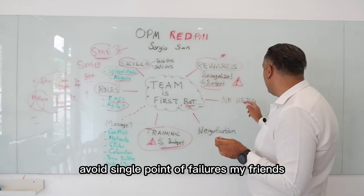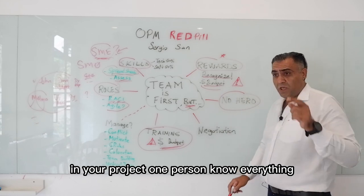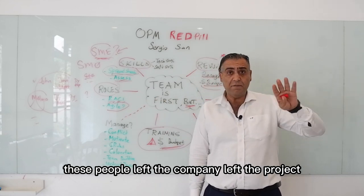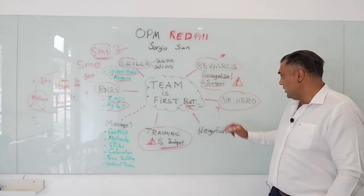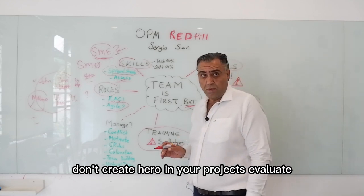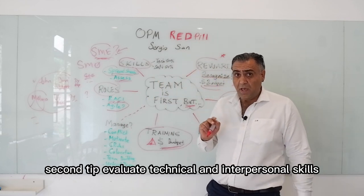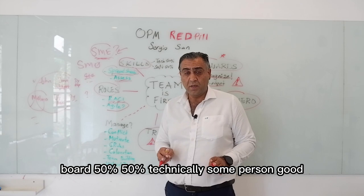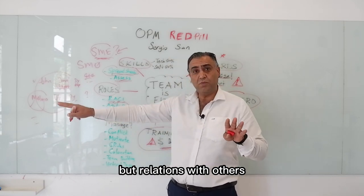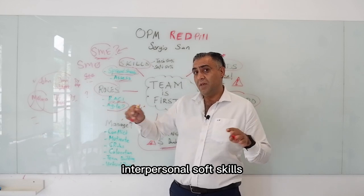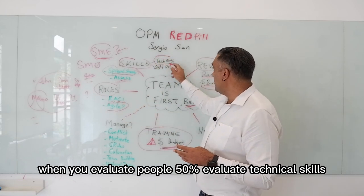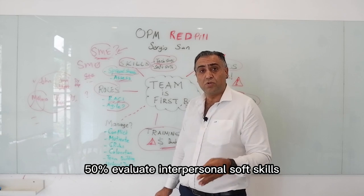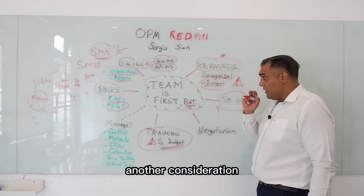Tips. Tip one: avoid single points of failure. In your project, if one person knows everything and knowledge is not transferred to others, and that person leaves the company or project — what will happen? Don't create a hero in your projects. Tip two: evaluate both technical and interpersonal skills — 50% technical, 50% interpersonal soft skills and relations with others.